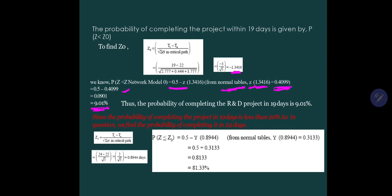The probability is very much less. The probability of completing the R&D project in 19 days is 9.01 percent, only 9.01 percent. Since the probability of completing the project in 19 days is less than 20 percent, we have to increase the days. So let's try another example.